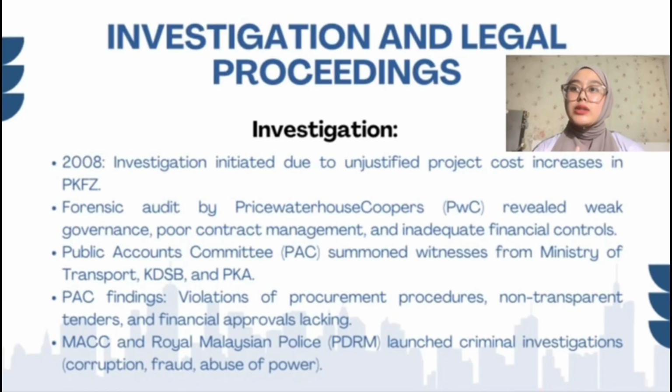The PAC, Public Accounts Committee, has also exposed that someone witnessed from the Ministry of Transport, KDSB, and PKA. The PAC finding has also exposed a violation of procurement procedure, non-transparent tender, and lacking financial approval. MACC and the Royal Malaysian Police (PDRM) launched a criminal investigation into corruption, fraud, and abuse of power.